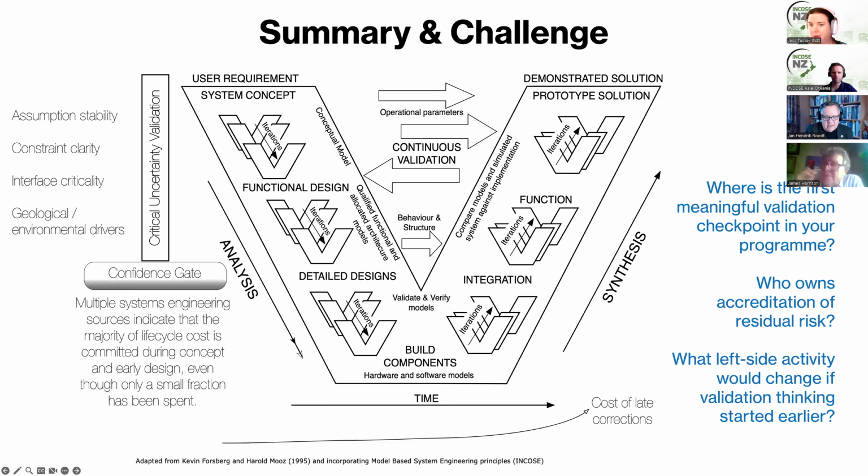And it was very interesting. I worked on a project a while back on the development of a new smelter for some interesting materials, and the question never came up about what the smelter should do. We knew that functionality was clear, but it hinged on one of the biggest risk assessment matrices I've ever worked with, because everybody needed to know what our assumptions were and what the impacts would be on the residual risk. And the project was eventually parked because of that risk assessment.